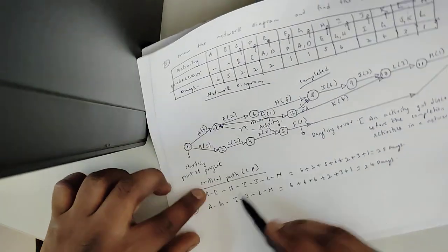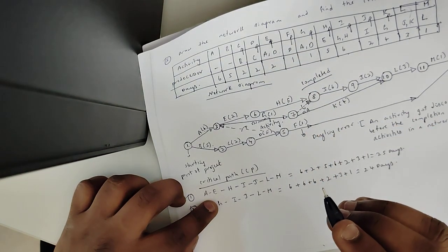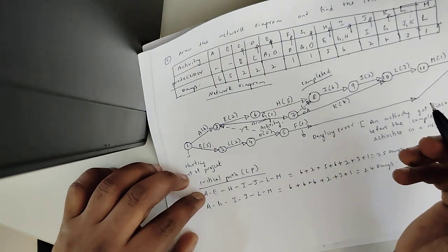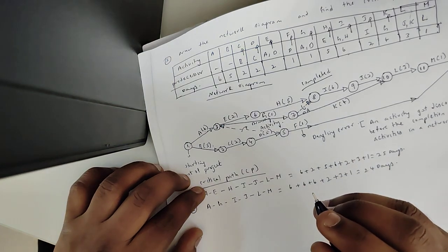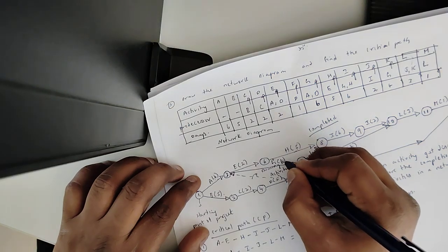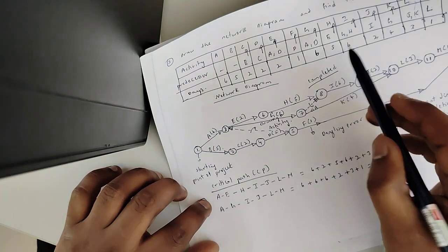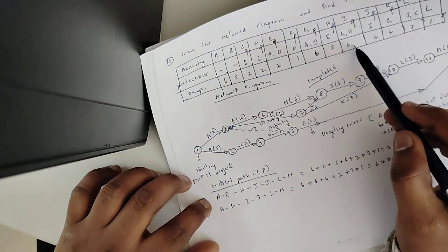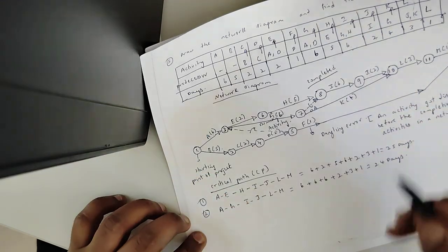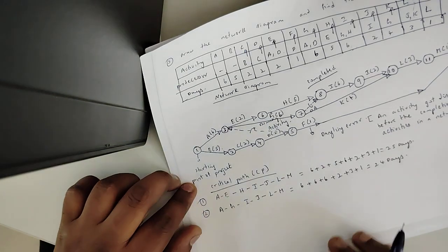Okay, see, A is 6, G is 6, sorry, G is 6, okay, this we mentioned as 6, so G is 6, then again I is 6, is it fine, and J is 2, L is 3 and M is 1, is it fine. So it takes 24 days to complete the task. Next we will see